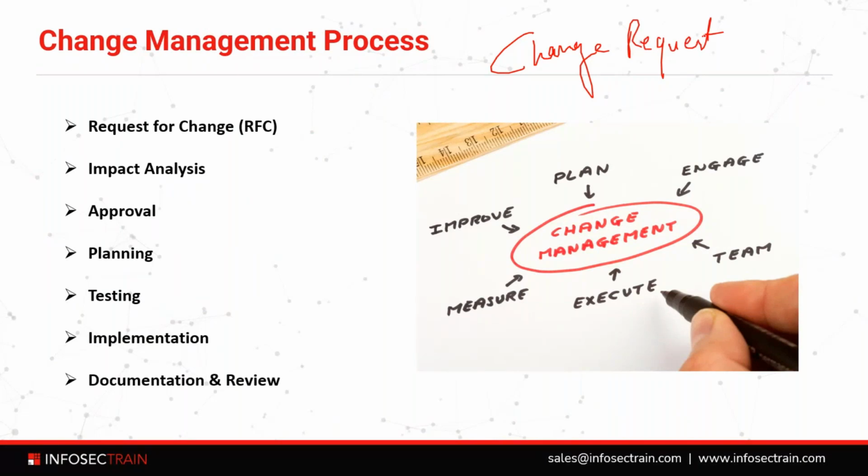Change request is generated when a fault needs to be fixed, a new business need or process is identified, or there is room for improvement in the existing standard operating procedures or system, right? The need to change is described either as reactive, where the change is forced on the organization, or as proactive, where the need for the change is anticipated and initiated internally, right?